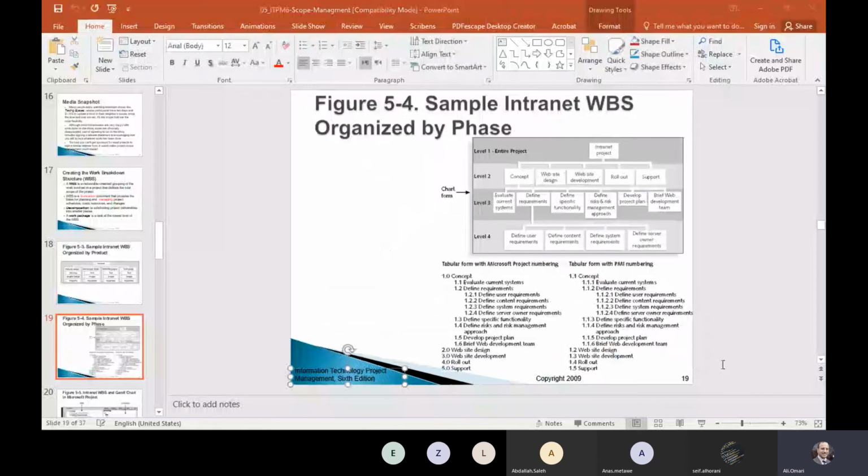Abdullah Saleh asks: it means we start with the outline, the main points? Exactly. You don't want to think about the details. If you think about the details, it will become like a brainstorm and will fade. And don't take it all at once. Think about the higher level, then leave it, then come down, take each level and think about it in detail. Sometimes you have to further divide the second level into a third level and the third level into a fourth level. It depends on your idea.